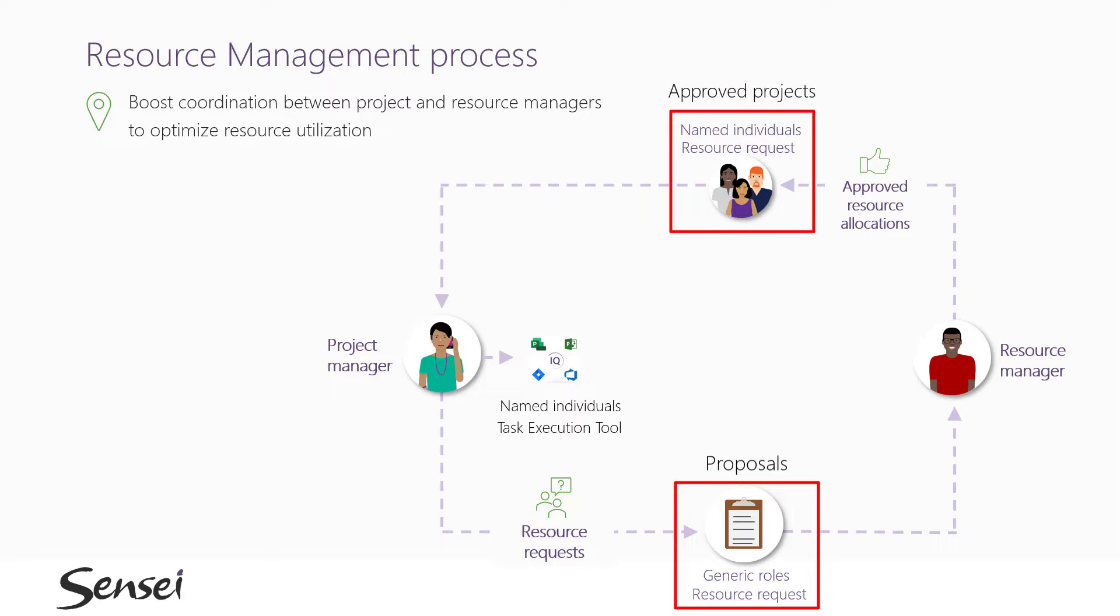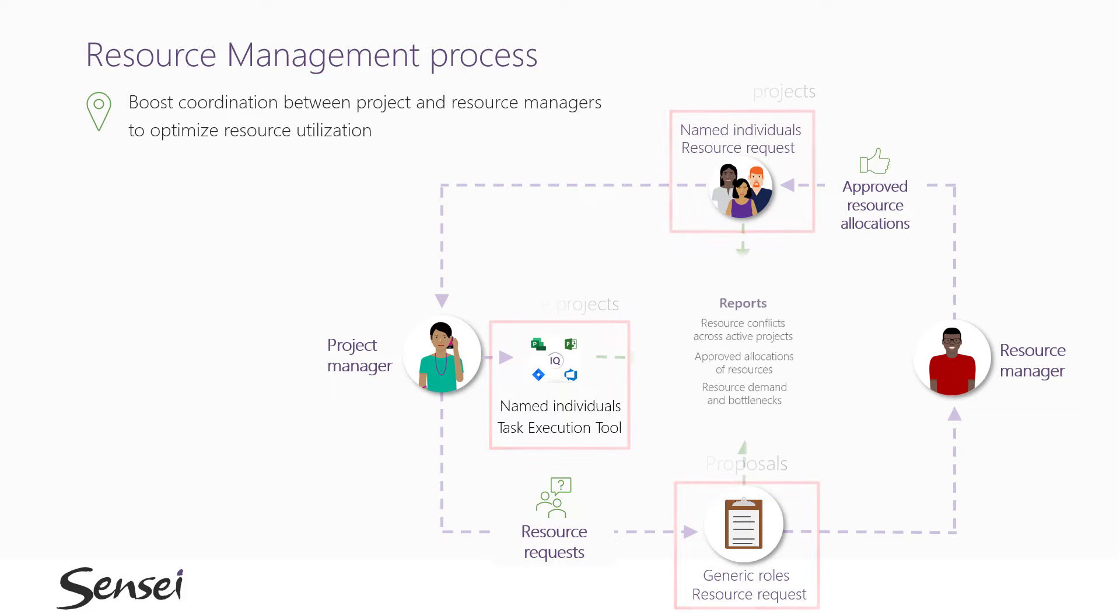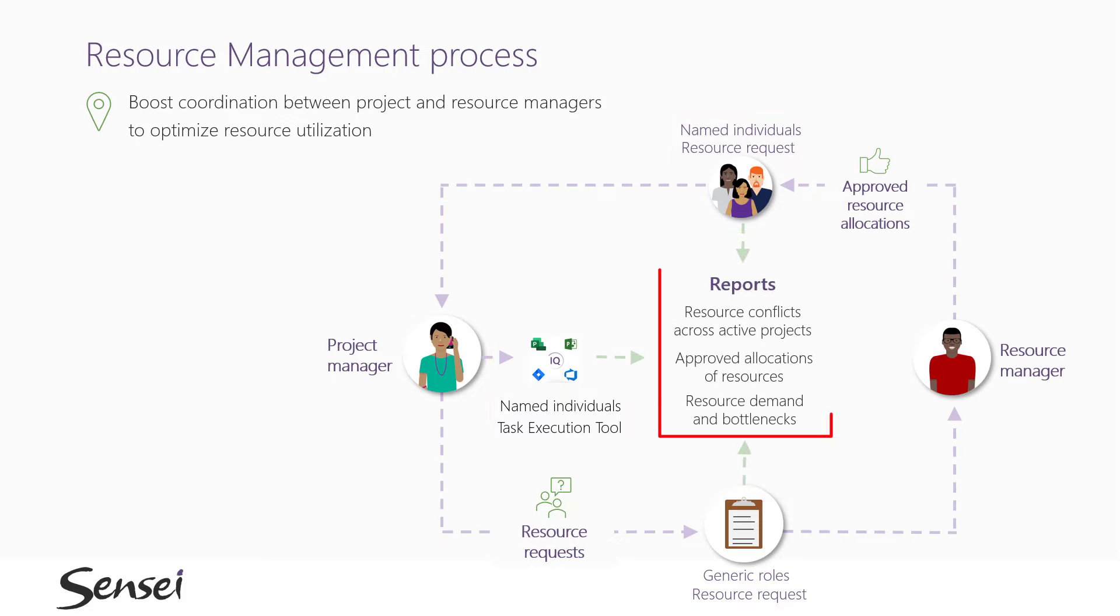There will also be approved projects with just a high-level resource plan, and then the active projects with the detailed scope and assignments. To get a complete picture of demand on these resources, our reports and dashboards must be able to view both proposed and approved allocations...